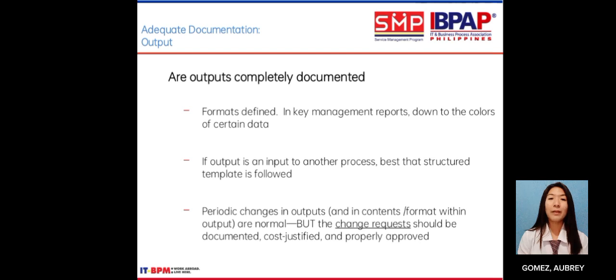Are outputs completely documented? Formats are defined in the key management reports, down to the colors of certain data. If output is an input to another process, it is best that a structured template is followed. Periodic changes in output, and in contents or formats within output, are normal, but the change requests should be documented, cost justified, and properly approved.